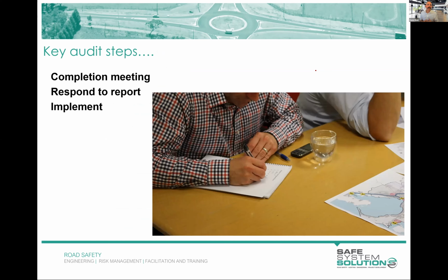Some sort of completion meeting. Now, in reality, most of the time, except sometimes for big projects, the completion meeting really isn't done as a meeting, but as an email or sometimes a phone call, just saying, here's the report, let me know if there's any issues. And that's fine, with clients receiving that who know what they're receiving and know what to do with it.